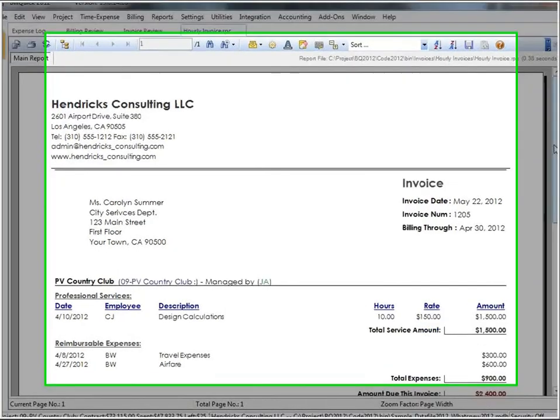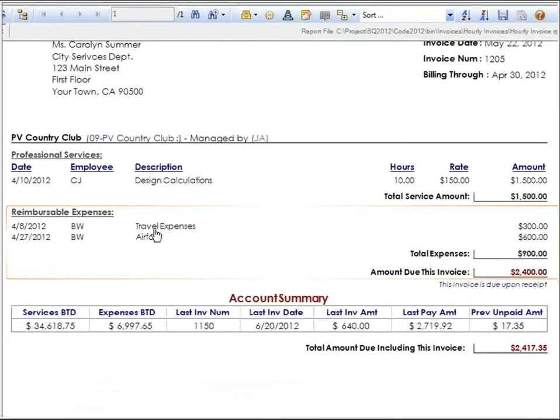So this gives you an ability to go ahead and bill in advance for expenses that you know are going to happen on this job. They're either on the credit card statement. The credit card statement hasn't arrived yet, but you know exactly how much the expense was. Bill those in advance, and then when the employees log those expenses, you can come back and attach those expenses to the invoice and have BillQuick then recalculate the profitability on that invoice and the actual job cost on that invoice.